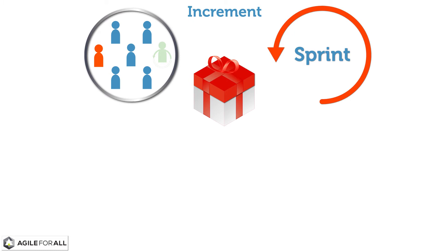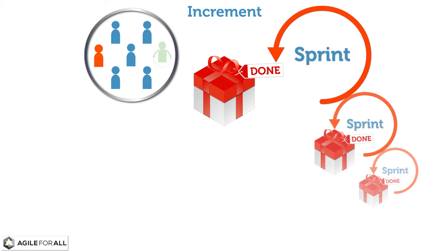The increment is considered done if it can be immediately released without any additional work. Each increment is additive to all prior increments and is thoroughly tested, ensuring that all increments work together.